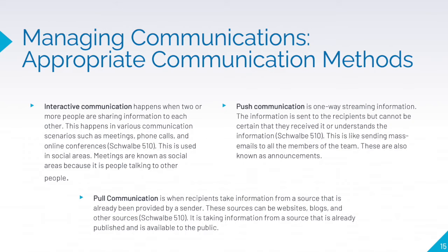Push communication is one-way streaming information. The information is sent to the recipients, but the sender cannot be certain that they receive it or understand the information. This is like sending mass emails to all members of the team. It is also known as announcements.